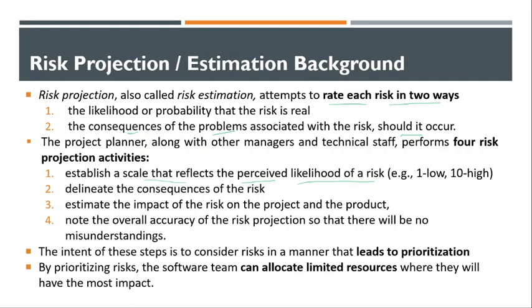Secondly, we delineate the consequence of the risk. Third, we estimate the impact of the risk on the project and the product, both.